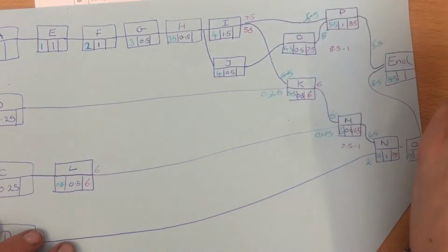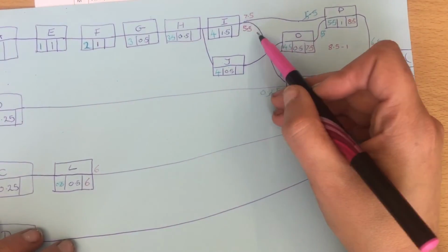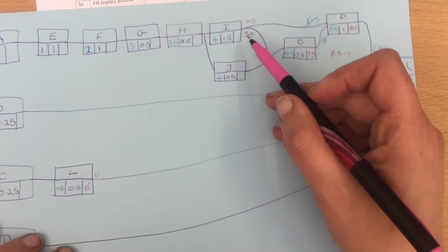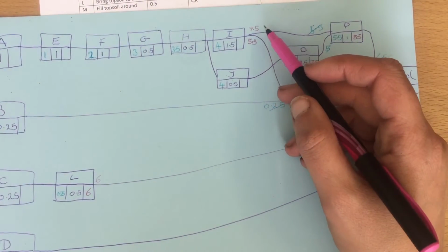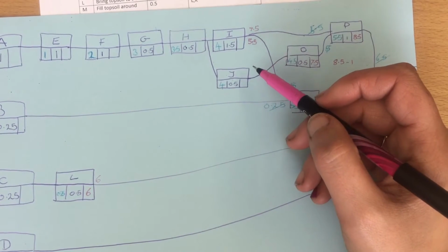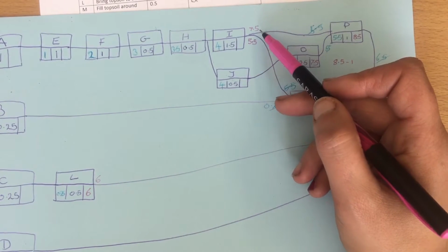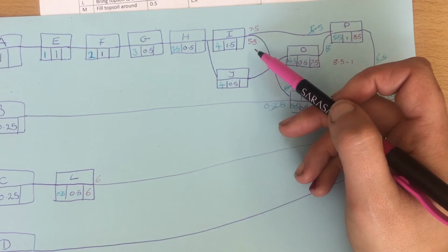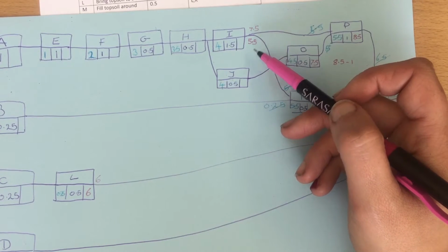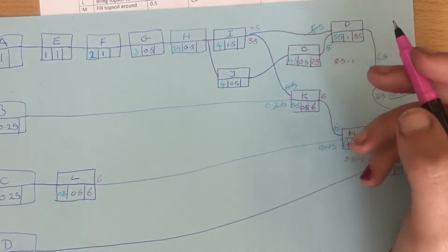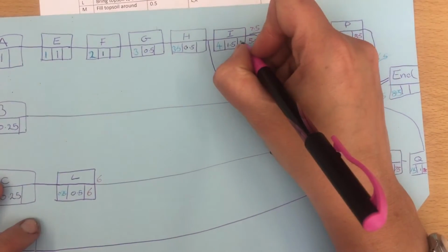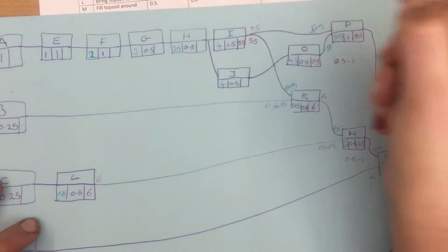So we've got 2 values here for a deadline. So if your deadline that you are given from one person is 7.5 and one person is 5.5, if you go with the 7.5, this guy is going to be running 2 hours late. If you go with 5.5, both of them are going to be happy. So we always choose the earliest deadline.